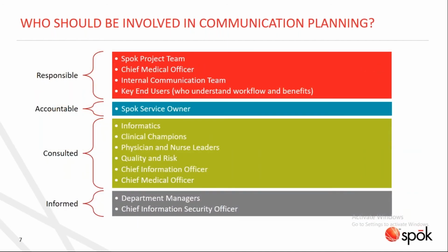So first, you've got to make sure you know who should be involved in this communication planning process. And what we see at Spok is most effective is that there is a named Spok service owner. Generally, that can be an IT or a clinical resource, but it needs to be a single person who's accountable to drive this communication plan.